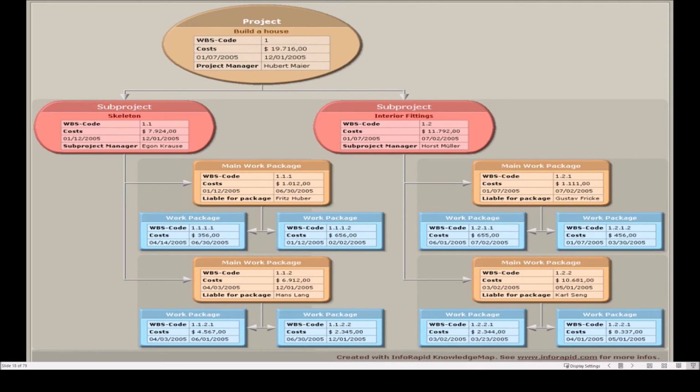Now we want to build up the time and the cost from the bottom upwards. So where we've gone with tasks from top down, we start from the most micro task, and we go, okay, this particular task down here, work breakdown structure code 1.1.1.1, which let's just say it's digging the foundation. When does it need to start?